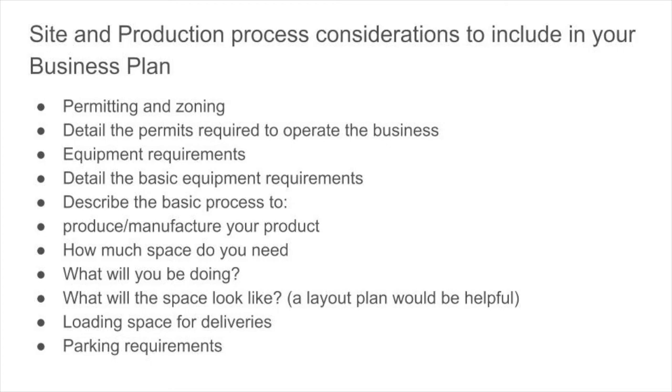From a site point of view, again, the nitty gritty is permitting and zoning. Like in Clareville, or most towns in Newfoundland, to set up a business, you have to get required permits. It has to be in the right zone. You can't put a business, for example, in the middle of a residential area. What are the permitting requirements? And your business plan really needs layout. This is what I need to do in order to make this work.